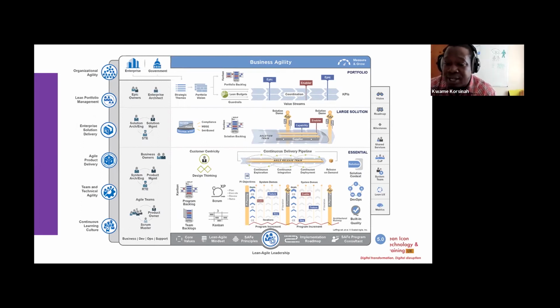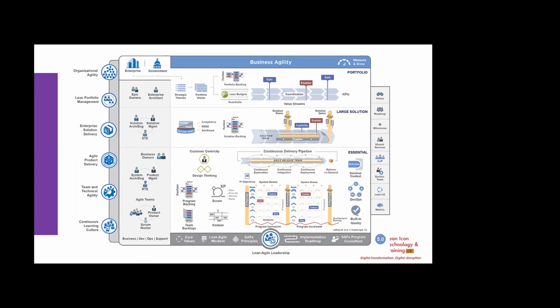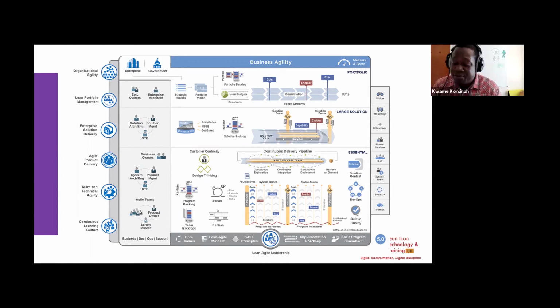I've seen waterfall organizations, or let me say, more Agile organizations, use daily stand-ups. They've tried to also use retrospectives. And when we look at retrospectives, they are lessons learned. But instead of doing it at the end of the project, now they are doing it much more often, after every 2 weeks or at the end of the month, so that they can get all that feedback to improve their processes. They are also looking at how they can adopt a better understanding of delivering the work. Though they might have Gantt charts, they've also got Kanban boards to help them manage the flow of the work.